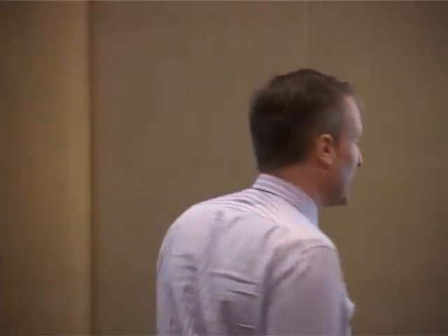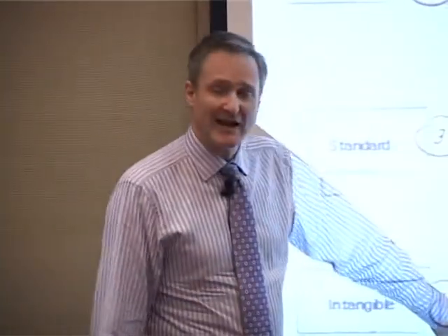You have to decide which person you're going to let down and which cost of delay you're going to incur. What if you had some intangible items on your board and an expedite request arrives? You take the people from the intangible item and you put them on the expedite request. That gets done. Everyone's happy. Nobody cries and you don't incur any cost of delay.